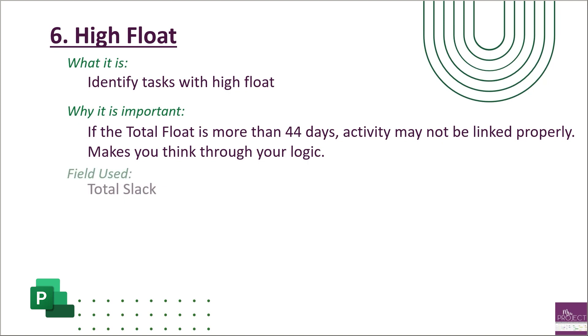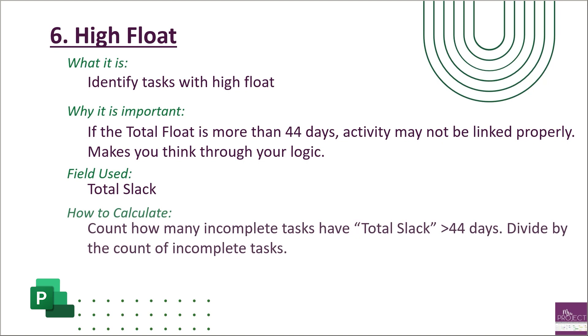The field used for this is your total slack field. You're gonna count how many incomplete tasks have a total slack that is greater than 44 days. Take that count and divide it by the count of incomplete tasks. The goal for this metric is you want to be less than five percent of your tasks that have a high float.